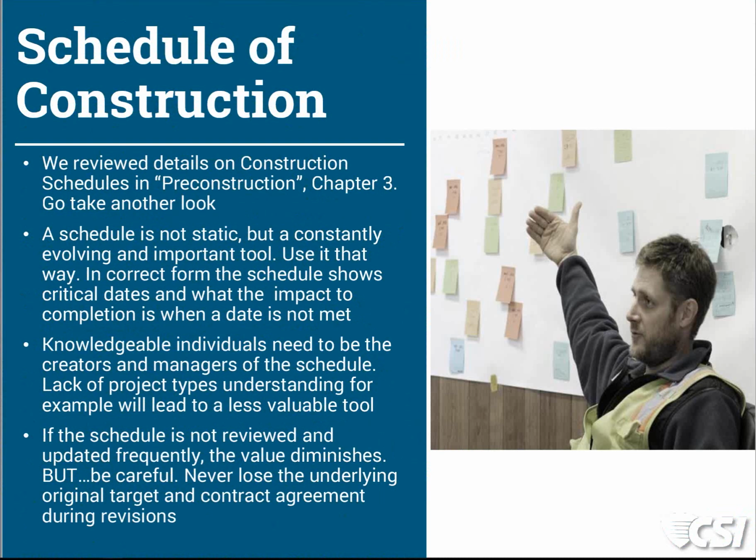There's opportunity saved in the job, time saved in the job, available for other tasks or for impacts of bad weather. That's great to have an adjustment and show on the schedule, but what we want to be sure to do is not to lose the original information, because that may become critical later on should the project get behind schedule, or should other issues occur, maybe there are problems with the job that might lead to mediation, arbitration, litigation.